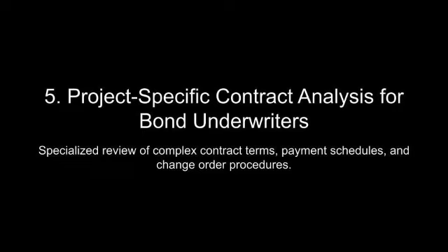Techniques for ensuring scope clarity include the use of detailed descriptions, measurable milestones, and unambiguous performance standards. For instance, a scope of work document for a construction project might specify the type and quantity of materials, the dimensions and specifications of the finished structure, and the timeline for each phase of the project. Incorporating measurable criteria, such as performance metrics or quality benchmarks, ensures that all parties have a shared understanding of what constitutes successful completion.